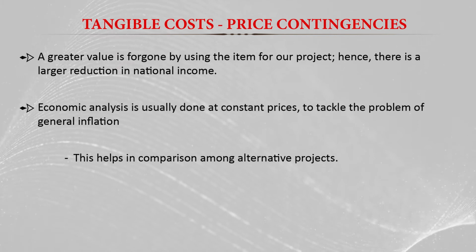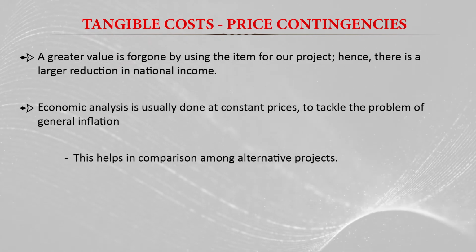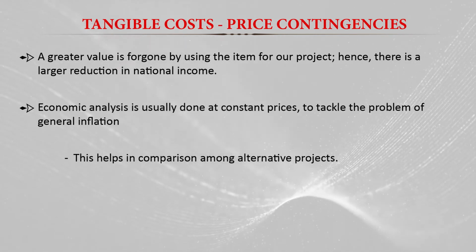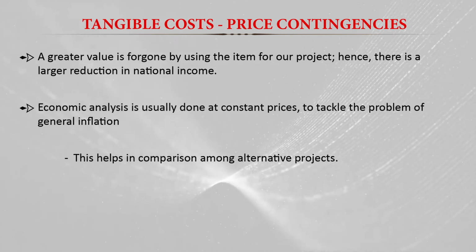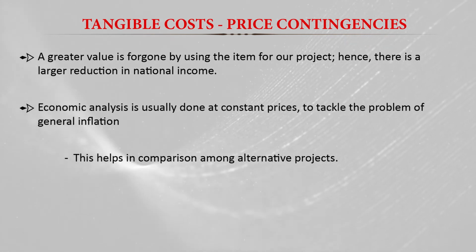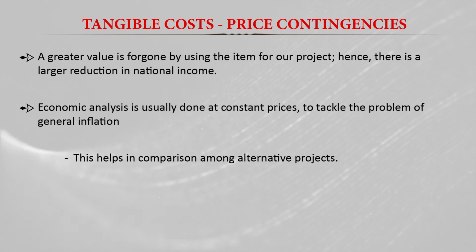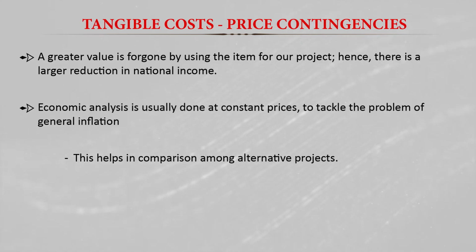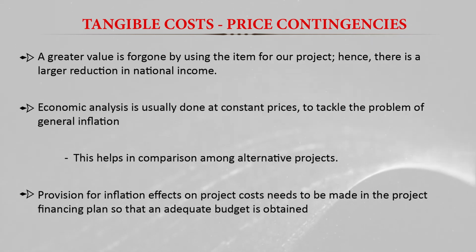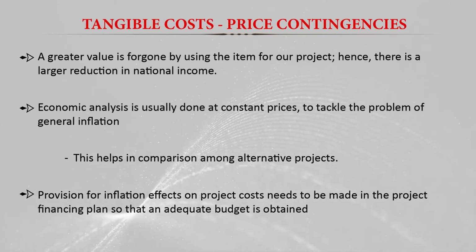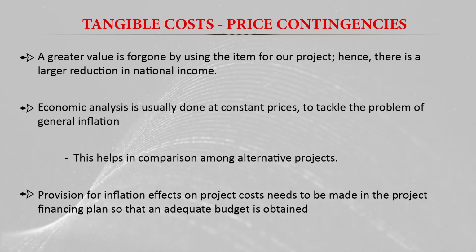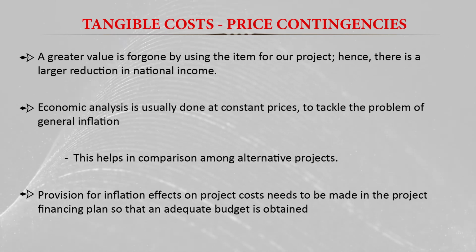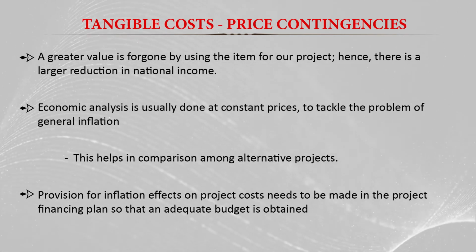If you take some base year index in calculating the costs and benefits, it helps in giving the correct picture of the different projects in terms of cost and benefit. The provision for inflation effect on the cost needs to be made in the project financing plan, so that an adequate budget is available, which is obtained from the sponsoring agency.